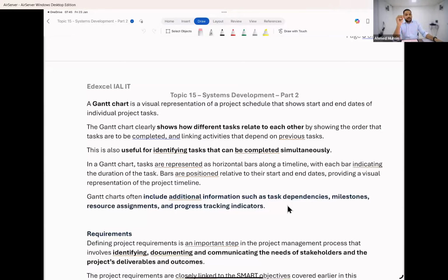Okay. So she's saying, for example, the teams have to be finalized. Once the team is finalized, only then ordering of jerseys can take place. Agree? Once the teams are finalized, only then you know how many people are playing. You know how many teams are playing. Once the teams are finalized, only then you can place an order for jerseys. Agree with me, right? That's a good example. That's a task dependency. Ordering of jerseys depends on the completion of finalizing of teams.